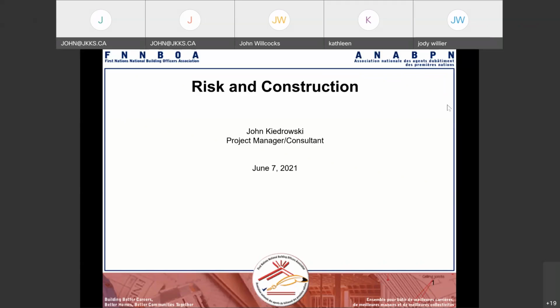But if you look at the new change order contracts, the contractor cannot charge you for architectural time on their redesigns. Cannot charge for that anymore. So that's a case right there in point where they had these documents out there to help everybody, but they're not being used. So it's just not an on or off reserve issue.